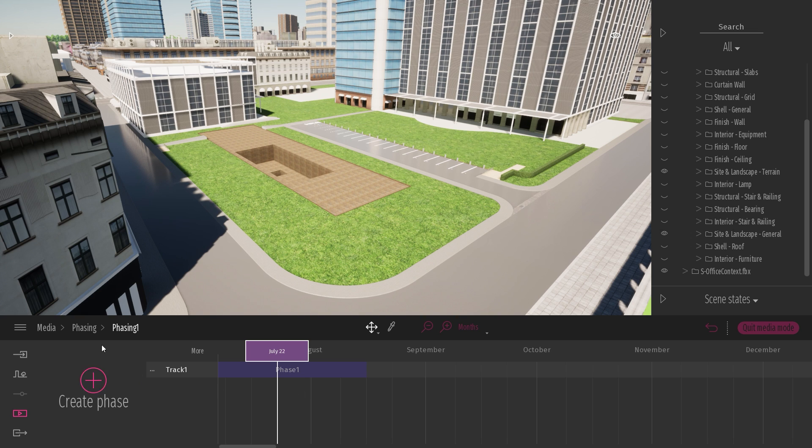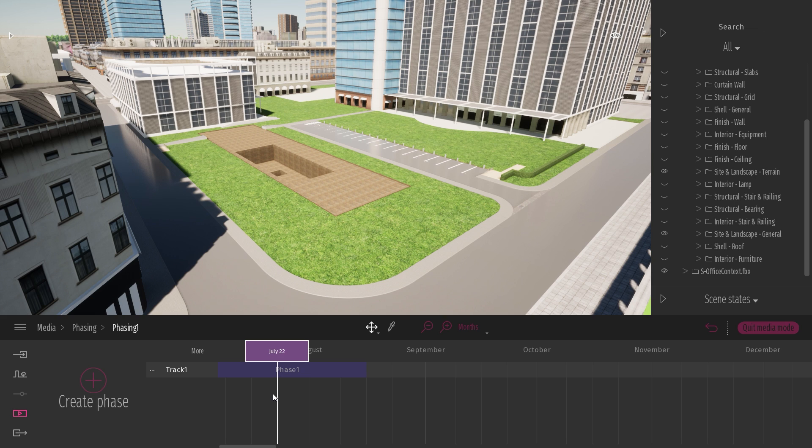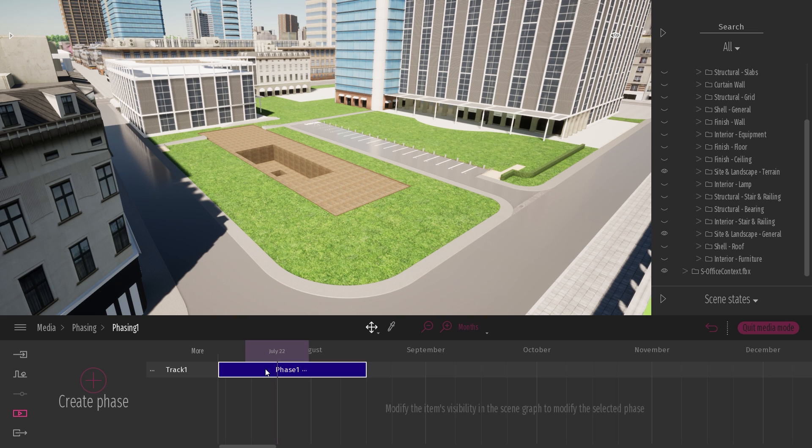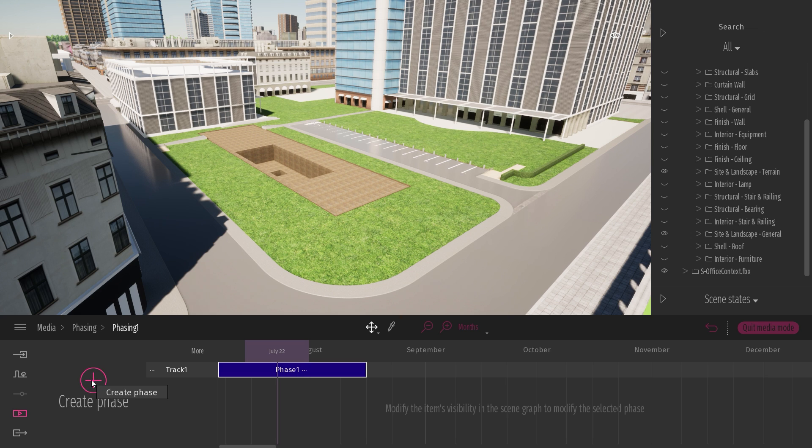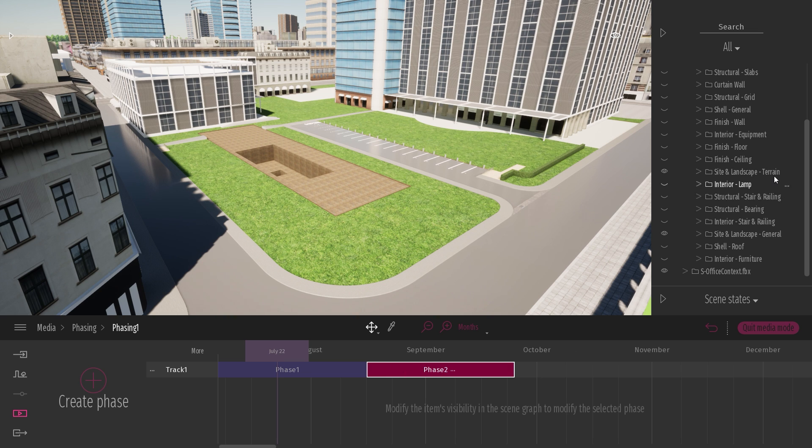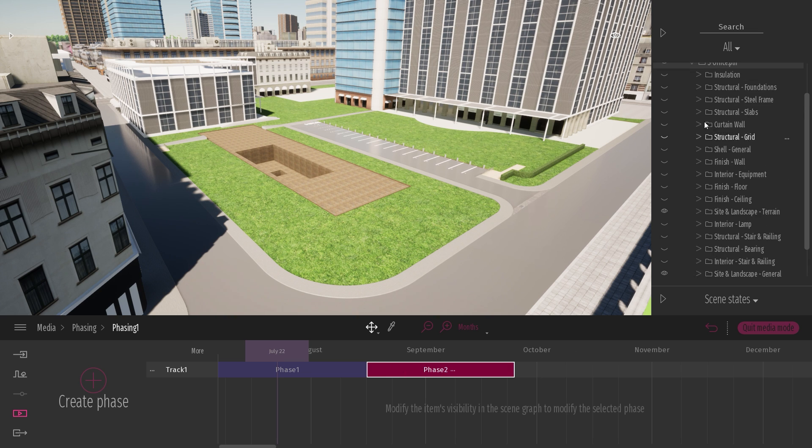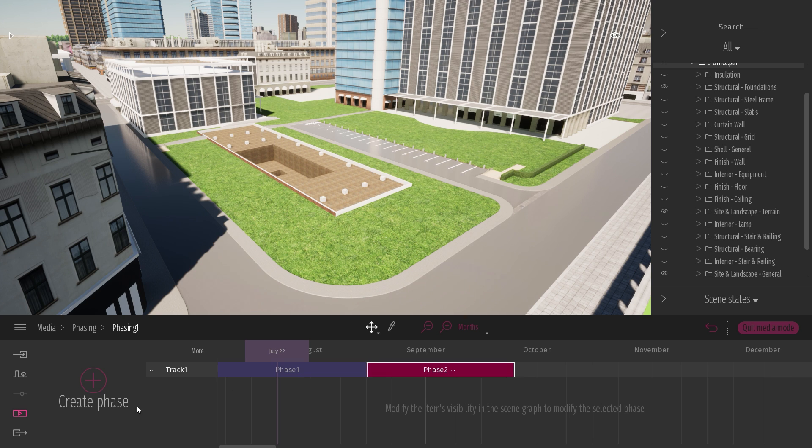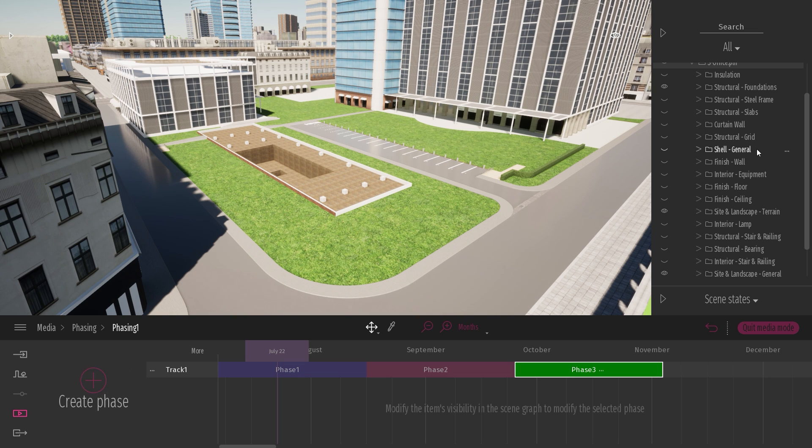So now let's create a new phase. To create a new phase, you need to click on the plus button. Before that, there are two different scenarios. Either you have already a phase selected. Here I have phase one selected. If I click on the plus button, this will create a new phase next to this one. So now in this new specific phase, I can for example start to unhide the foundation. I can create a third phase. And in this phase, I will come to the slabs.